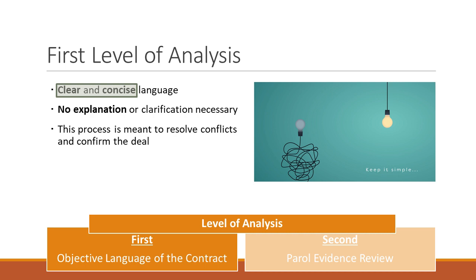They can't explain or clarify. They can't bring in external information. Well, this is what we really meant. I know it says that we were supposed to be paid $150 for this work, but really it's $175 because of all these other things that we talked about on the side. Well, if it's not in the contract, the court's not going to enforce that.